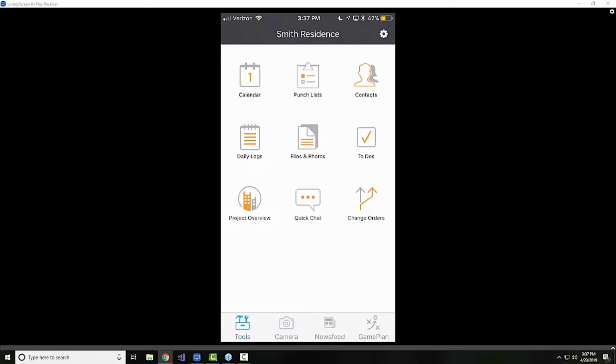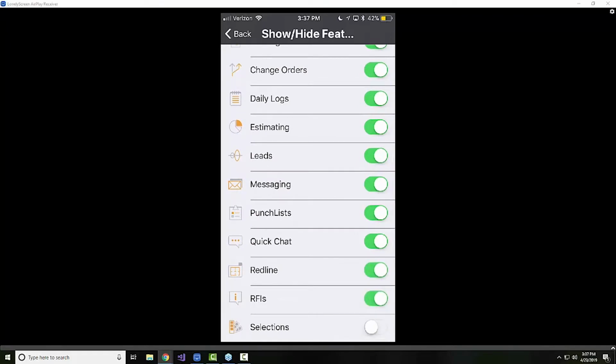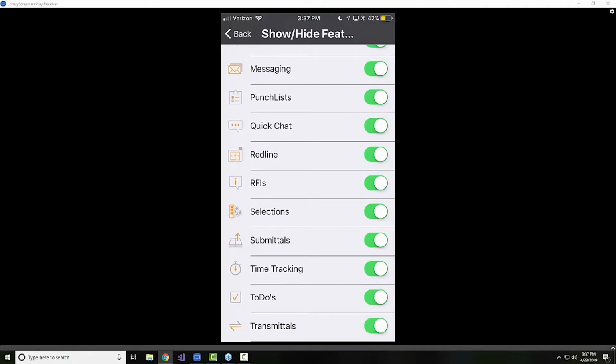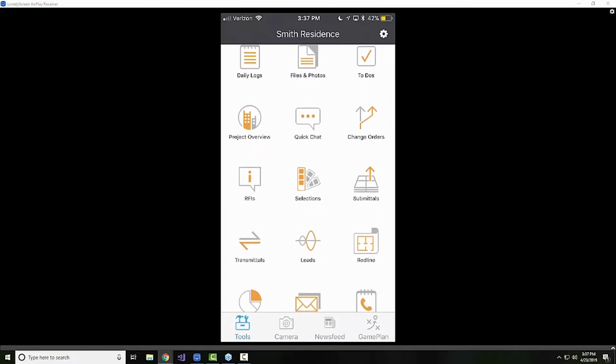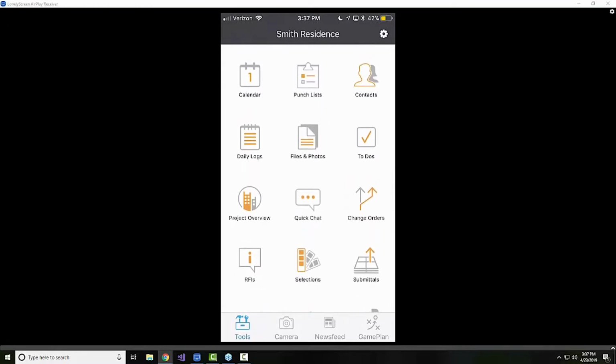Now, again, as we're working through these change orders, it's important to note that from the app, you have easy access and easy tools available to put that information together, both on your phone or on an iPad or an Android tablet, wherever it may be. I would recommend empowering your field staff to put those change orders together, not necessarily make them live right away, but at least start that process. Anytime a customer comes to talk to you about a potential change on one of these jobs, go ahead and create that change order, set it to a draft status, and that way everybody back in the office will get that automatic notification that that information is coming together.